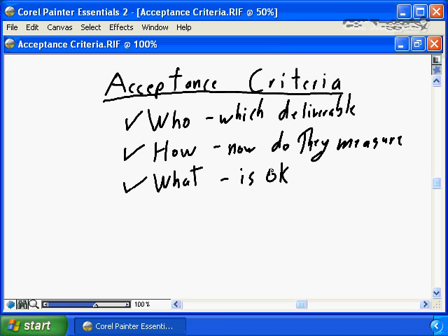Those 3 flaws, a missing piece of finish, a chip on a piece of paint, a cracked tile, are not enough to say, I will not accept the home. They're simply saying, the home is okay, but I will accept it with these 3 flaws, but they must be fixed in 10 days. So it's entirely possible in a business scenario to deliver a final product to the business that has flaws. So again, you're defining what is the acceptance criteria, what is deemed acceptable.